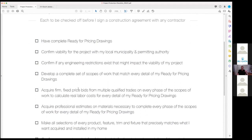When I say that, going back to our kitchen example, we want you to go out there and actually pick out your kitchen appliances. This is more true than ever right now with COVID, because just like you can't find a car on the lot anymore because of those little computer chips made in Taiwan somewhere that are slowing everything down, most appliances are 6, 7, 8 months lead times.